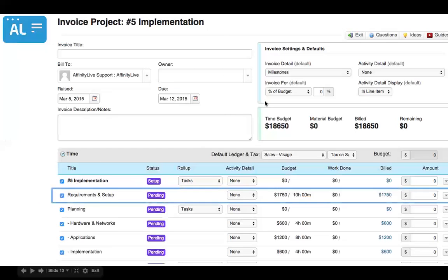At this time, I would also be able to select how I want to invoice. So some people like a 25% retainer or down payment on the initial project. You can do that as well by saying 25% of budget. Or in HDMZ's example, they invoice for time and materials. And you can do that as well, looking at how much I've logged within the past week or the past month before I send it out.